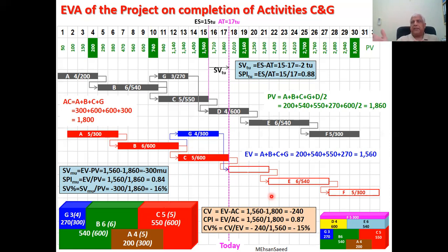So we continue doing this exercise as the project goes on, till such time the project finishes. We also do earned value analysis when the project finishes so that we can establish if the project is complete in the real sense, in terms of scope. As we do this exercise, we keep transferring this data onto the chart. Remember, we had created the chart. As we do this earned value analysis, we also transfer the data to that chart, and also some other charts for tracking purposes, which I'll cover later.